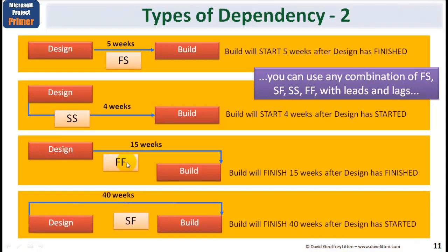One more for luck. This is start to finish. Notice the dependency is between the start of design and the finish of build. This says quite clearly that build will finish 40 weeks after design has started. Now, it may not be absolutely clear to you why you'd want to have all these combinations for now, but we'll discuss this further in remaining modules.